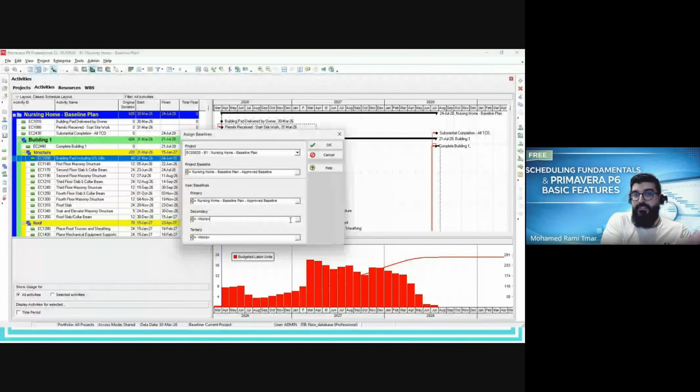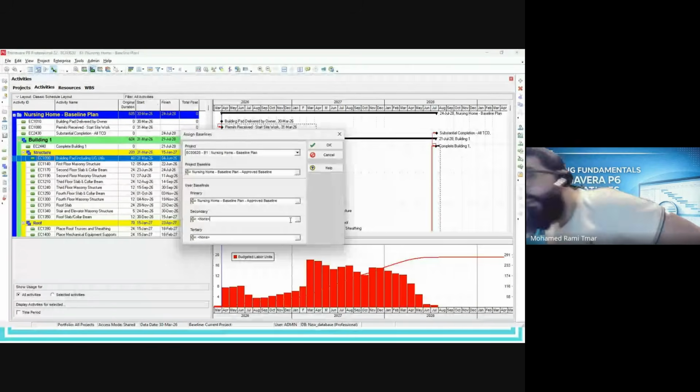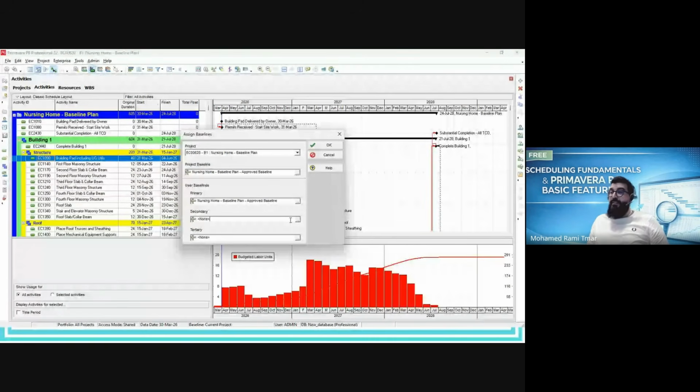If there is any system in the company which is linked and integrated with this Primavera P6, you don't have any choice, and you need to respect your procedure and your system, and you need to apply the effective way of automatic update using the software. Like, for example, integration between Primavera P6 and Oracle Unifier, or the integration between Oracle Primavera P6 and Ecosys. This software, using the API, has a capability of integration which gives you the possibility to update your schedule systematically and always.